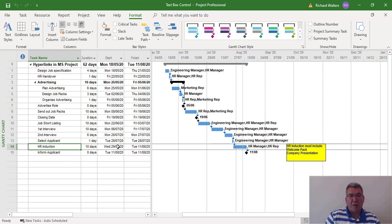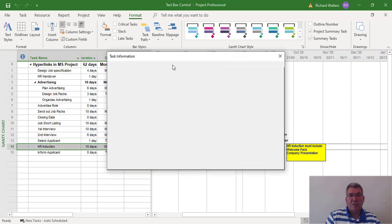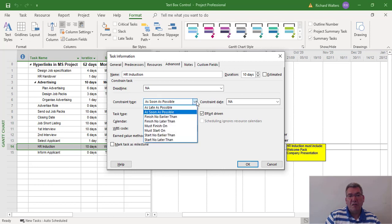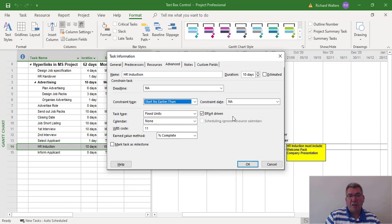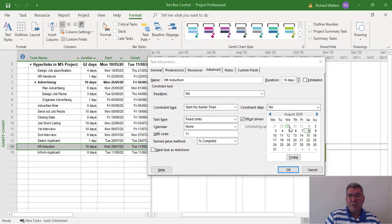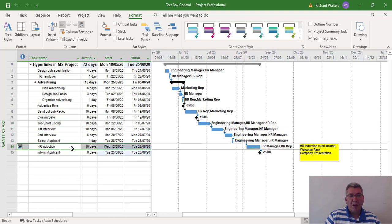I'll move it on a week, two weeks in this example. The task is due in this example 29th of July. I'll move it on a couple of weeks. So I'll constrain it. It's starting early then. And I just want the date to go on two weeks. So here's the 29th of July. I'll just go forward to the 12th of August. Click OK. We can now see that the task is moving along.